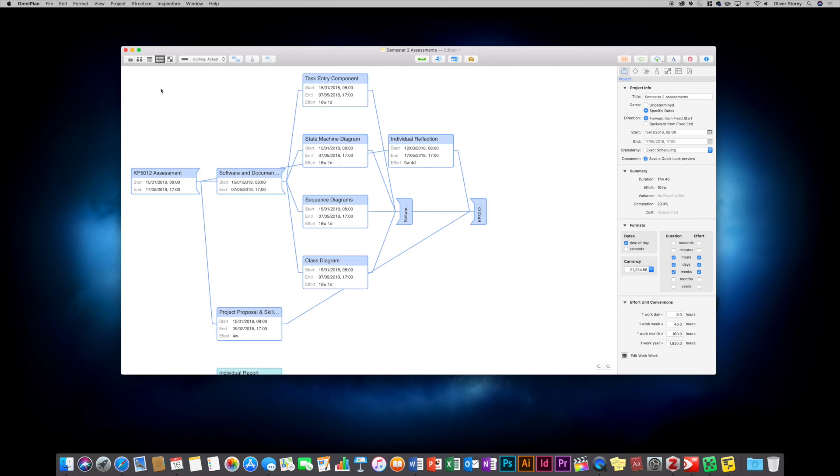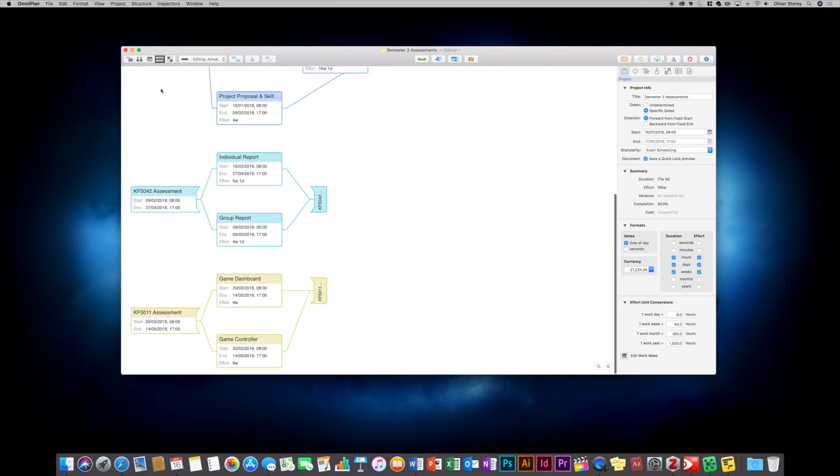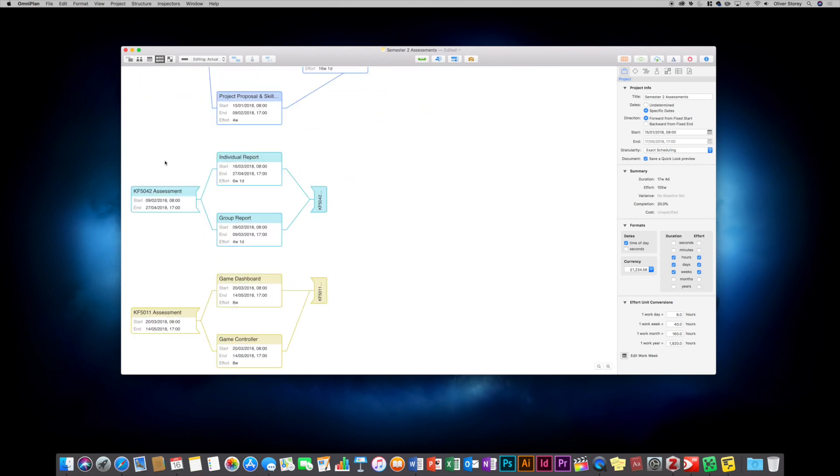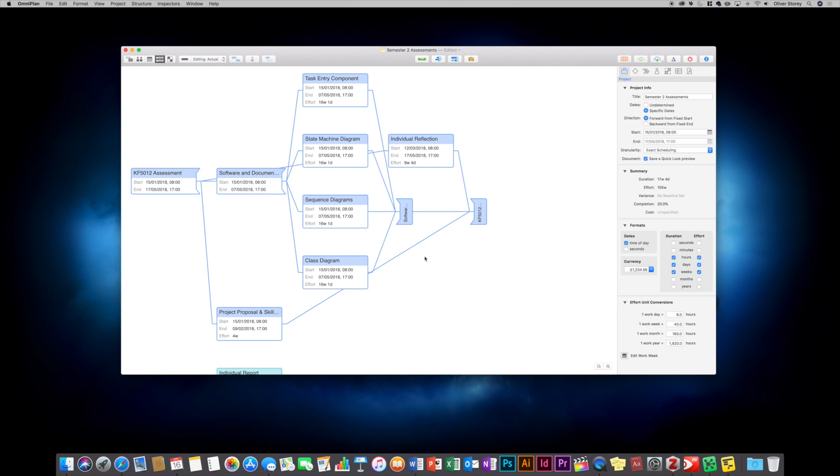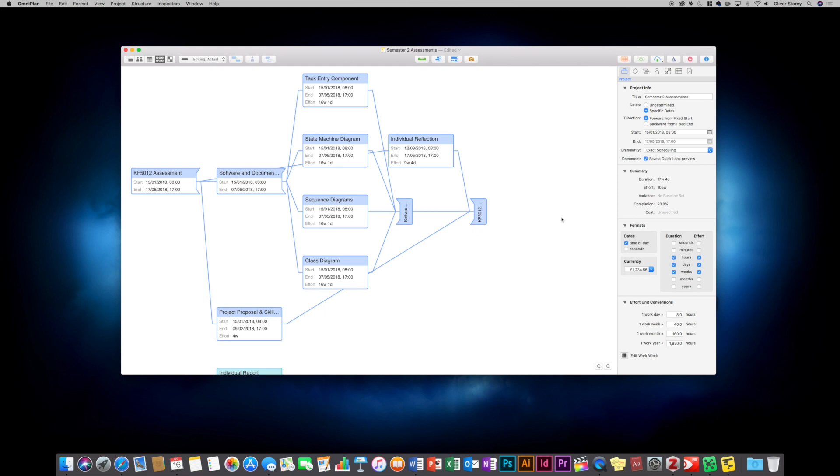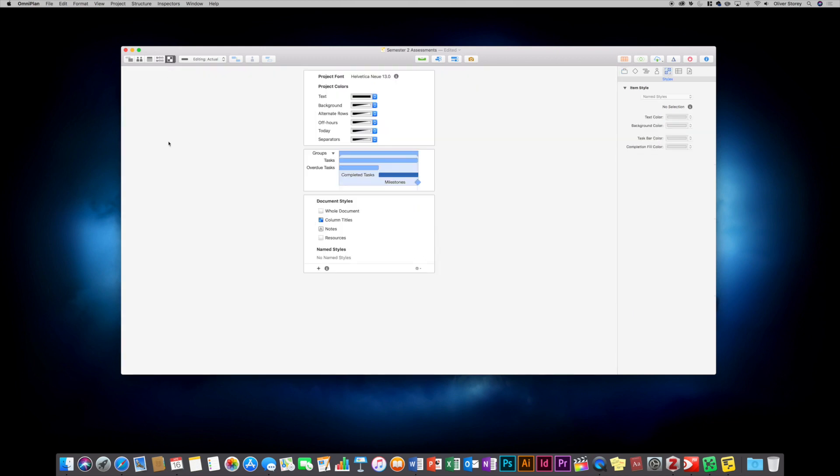You've also got this network chart view here, which basically just shows you the individual tasks and the order that things need to be completed in. It splits off into different things and then has its own dependencies. Just the way it's generated that view, it looks a bit messy for that particular task there, but that's how it shows those on a network map.